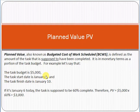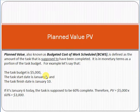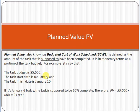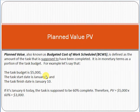Examples of projects include building a house, building a flyover, introducing a new business process in a company, and implementation of a mobile application. Now, is production of chairs a project? No — production of chairs is not a project because it is an ongoing task; it is not temporary and not unique. A project must have a unique output and must be temporary.